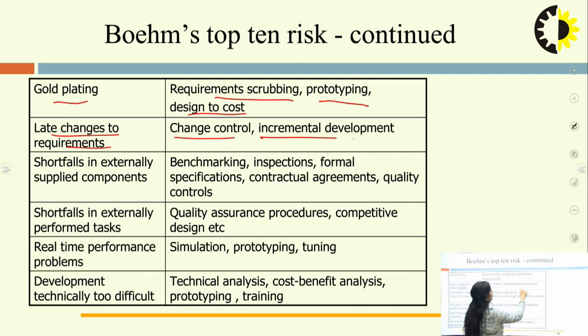Change control and incremental development model can be used to overcome that particular project. So, in which type of projects will this particular issue come? This will come in the cases where the client is not aware of their requirements. Next one, shortfall in the externally supplied components.